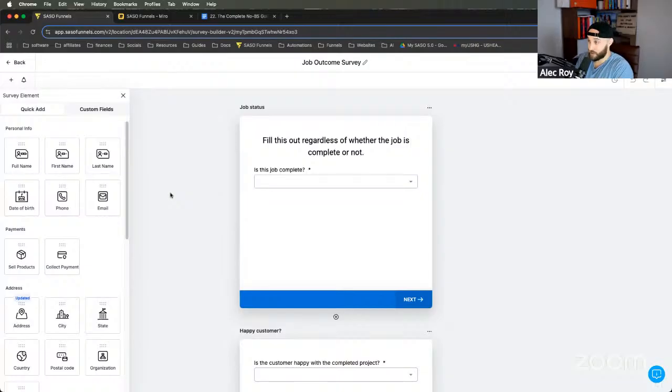Right. So the certificate of completion for some businesses is actually what they use to get their final payment released. So for roofers, if they're working with insurance, they have to have that COC to get the insurance payment released. But it's a really beneficial thing to use because nobody's going to complain if they sign off on that. Right. You're either going to look like an idiot because you signed off on something that says you're happy when you weren't, or you're going to bring up your actual reason for being unhappy, which means let's fix it, right?